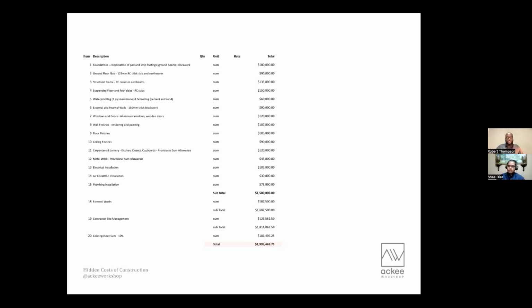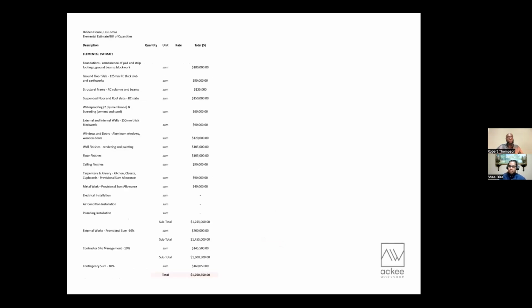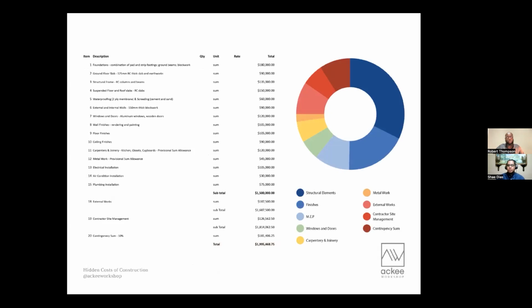Another thing I'd like to add as well, Shae, if you go back to the last slide, is that in some cases, the earlier in the process, your contingency percentage might be bigger to cover for those unknown items. So that's something to keep in mind. So, as I said, we'll be going through this example of the builder's estimate throughout the presentation so you can understand the different components and the different cost distributions based on what kind of materials or services that we had purchased.